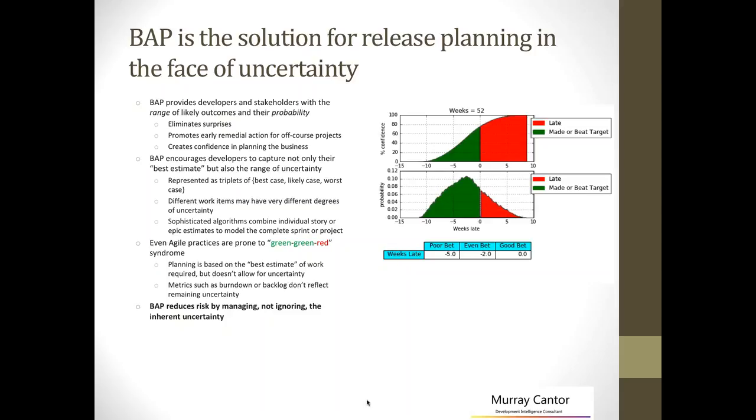Okay, so if you have change requests, there's some amount of uncertainty in each of them, and you want to have a deadline for when you're going to commit to those sets of change requests. Then you use the Bayesian Agile Planner, which by the way runs very interactively in a scenario mode, and you say, okay, can I achieve this with the team I have and the historical velocity ranges I know about? Can I make that? What is the certainty I can make that commitment even in the next, say, sprint? And we can do this at the sprint level. And what you want to do is choose scenarios which you have about an 80% chance of making.